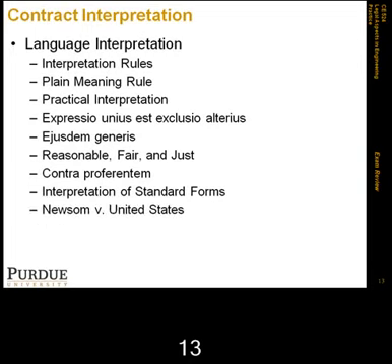We also talked about a bunch of other interpretation questions. We talked about the fact that courts look closely at the indemnification clauses, and we also asked what happens with errors in bidding documents, and the interpretation assumed is usually that of any reasonable, prudent bidder. So that's the one that's being sought. We had a case of Newsom versus the United States, where this was a VA hospital improvement project that was being built, and there was a patent